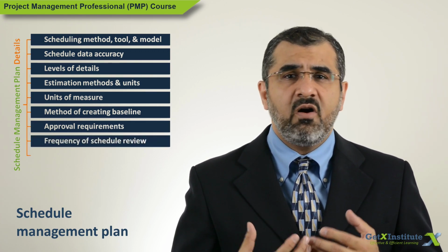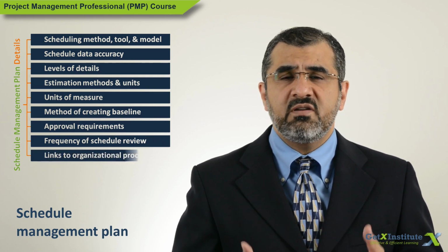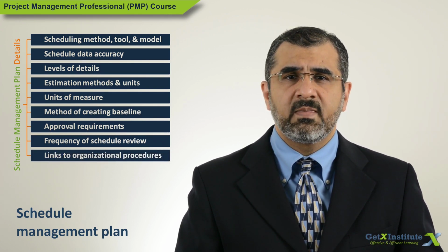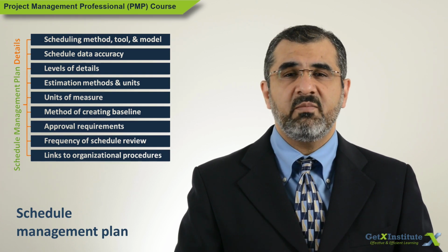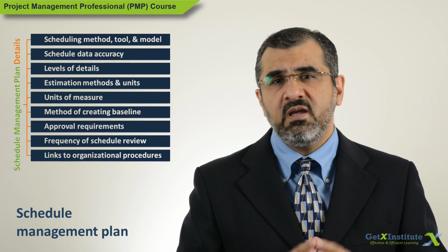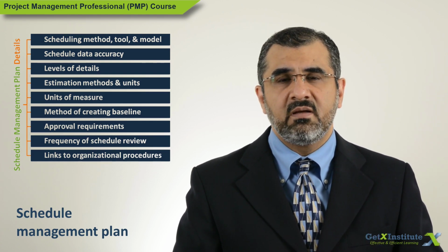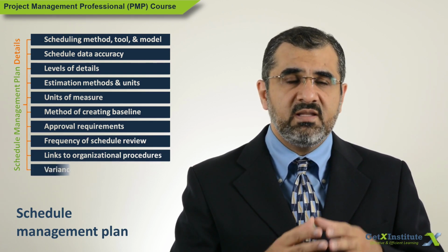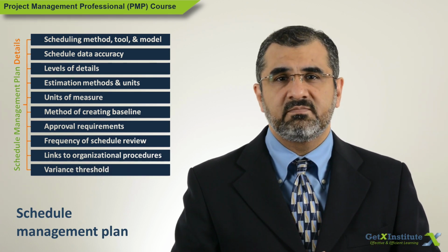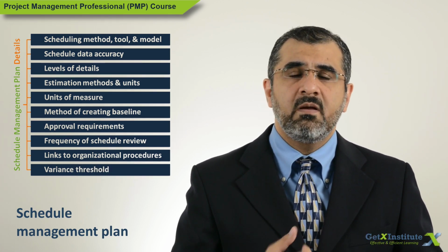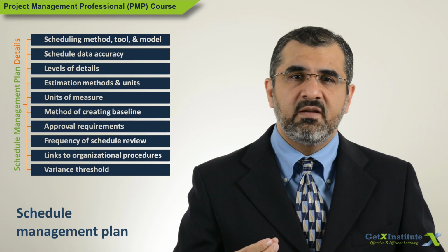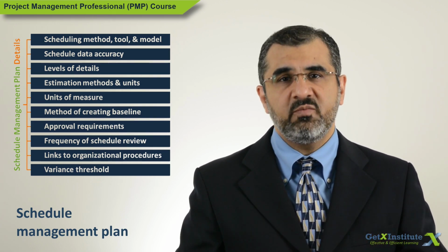Are there any organizational procedure requirements? Reporting can be one such requirement. So what will be the reporting format, frequency, and method? How much variation in the schedule is acceptable? Or if I say, how late is too late that the schedule baseline needs to be revised?